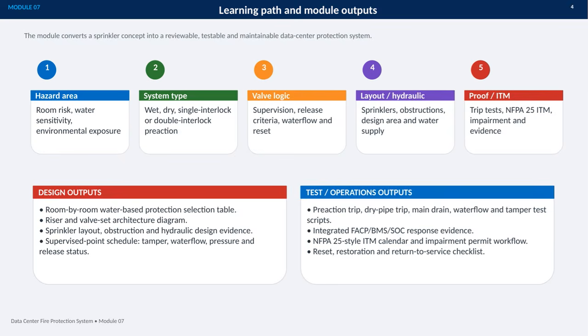The operations outputs go further, providing test scripts, integrated FACP, BMS, and SOC response evidence, an NFPA 25 style IDM calendar, an impairment workflow, and a reset and return to service checklist. The goal is a complete, traceable system from design through operation.